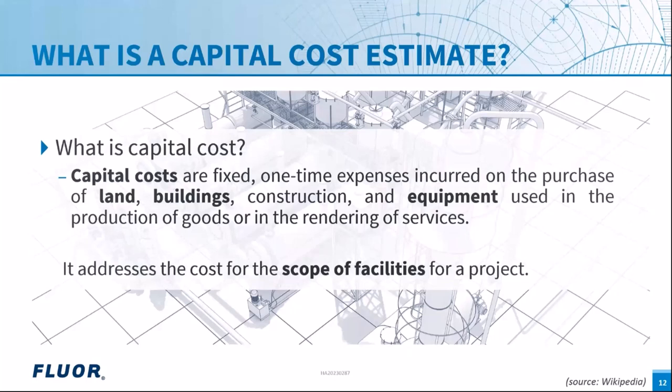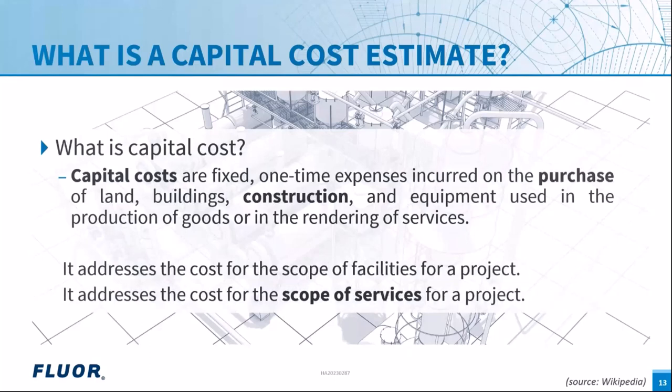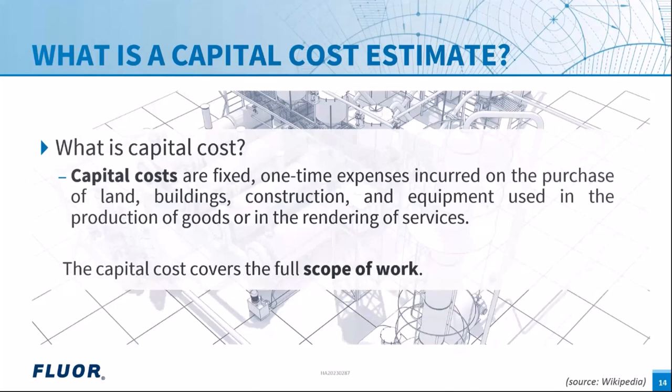But it's not only the scope of facilities addressed in this definition — there is also scope of services. We need to purchase all materials, ensure they are delivered on site at the right time, do the construction including pouring concrete, welding pipes, and installing equipment. And importantly, as an engineering company, we need to design the whole facility. Combining scope of services with scope of facilities gives us the scope of work of a capital cost investment.